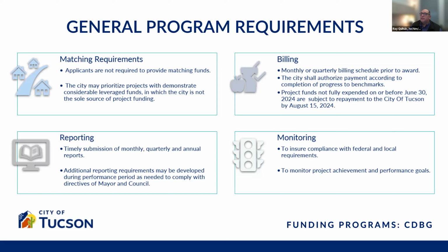General program requirements. With matching requirements, applicants are not required to provide matching funds. The city may prioritize projects which demonstrate considerable leveraged funds, in which the city is not the sole source of the project funding. With billing, a monthly or quarterly billing schedule is needed prior to award. The city shall authorize payments according to completion of benchmarks.